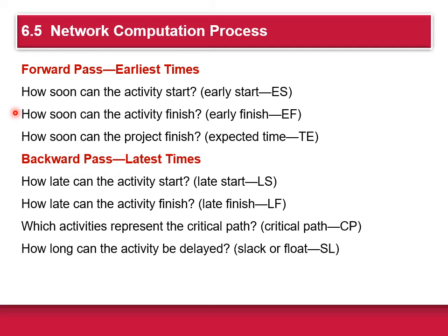So drawing the project network, that graphical form we saw earlier, places the activities in the right sequence, but we also need to be able to put times on things. The activity time estimates are taken from the work package, and they're added to the network. By performing a few simple computations, adding and subtracting, the project manager can complete a process known as a forward and backward pass, and we'll talk more about that when we look at an example.